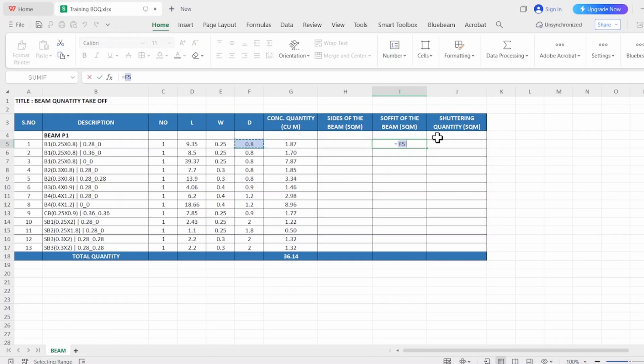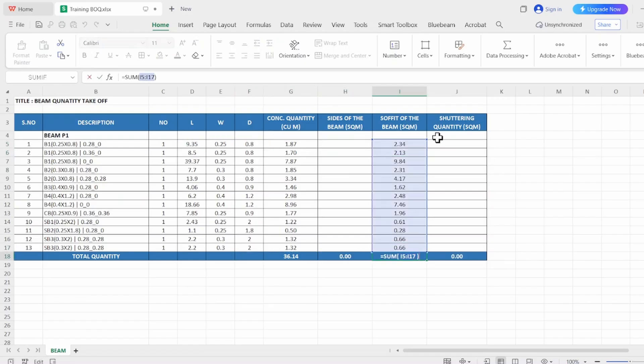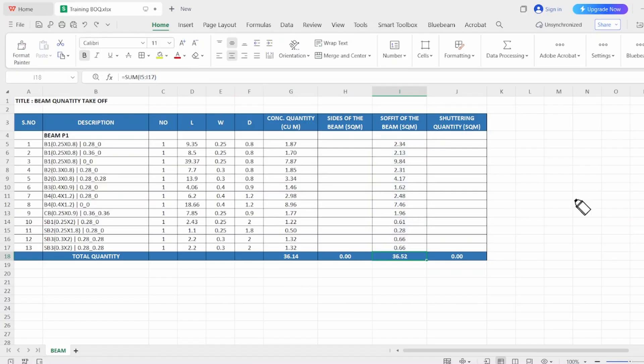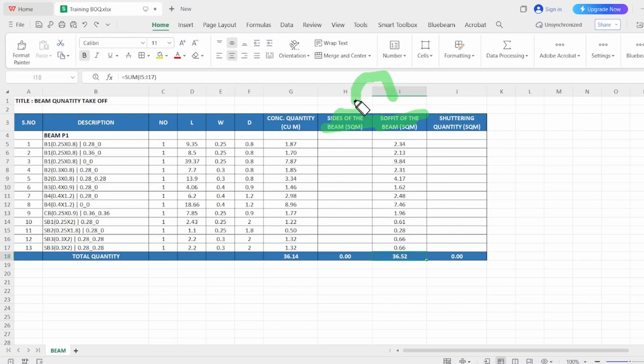You've got the soffit quantity is 36.52. While preparing a BOQ, we need sides separate, soffit separate. That's why we are measuring in two different sections. So we know there is always two sides of the beam.